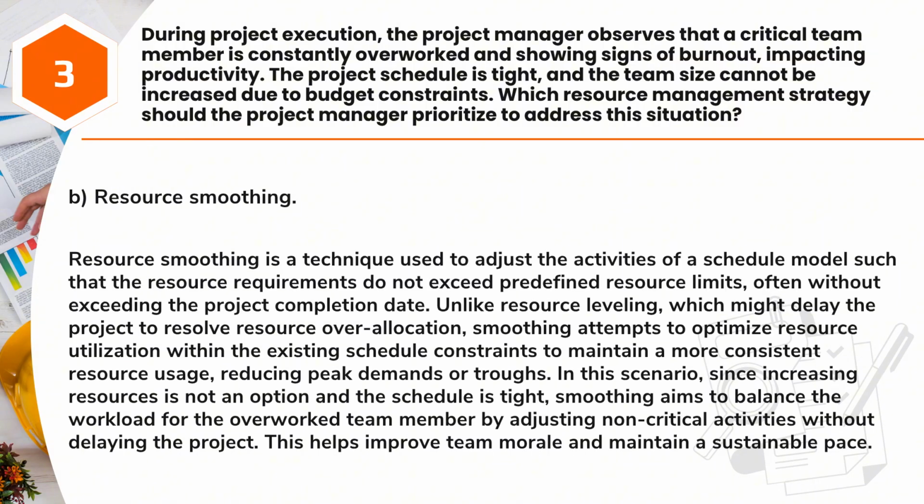Answer: B. Resource smoothing. Resource smoothing is a technique used to adjust the activities of a schedule model such that the resource requirements do not exceed predefined resource limits, often without exceeding the project completion date. Unlike resource leveling, which might delay the project to resolve resource overallocation, smoothing attempts to optimize resource utilization within the existing schedule constraints to maintain a more consistent resource usage, reducing peak demands or troughs.